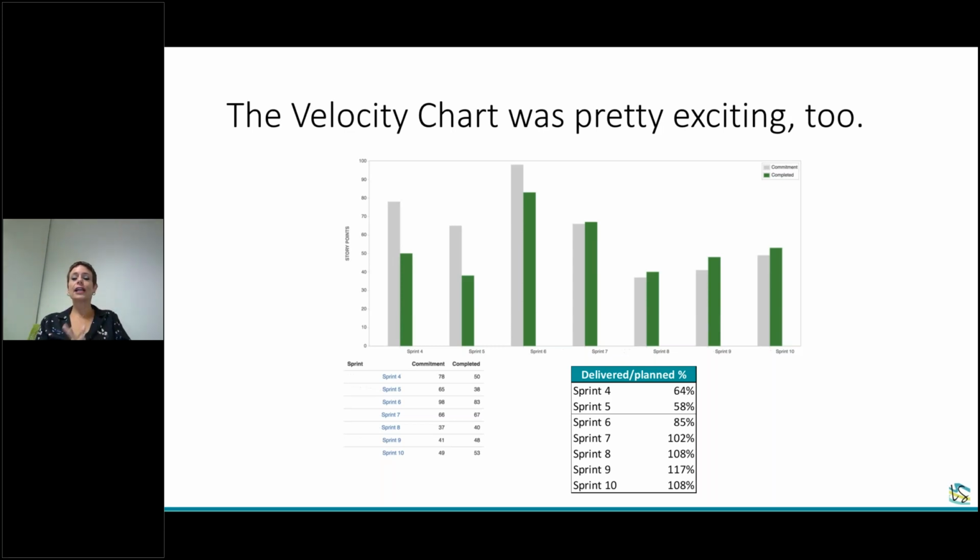It is so exciting. The reason they actually are delivering slightly more than what they started the sprint with is because we also decided to start building in a little wiggle room. We were never 100% utilized after that point. So if we knew we could complete 40 story points, we planned for 30, and we left some wiggle room. Another big piece of flow theory and queuing theory is that you have to leave some room for utilization. So 2 beautiful things about this chart.